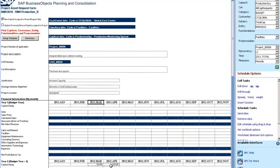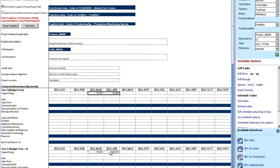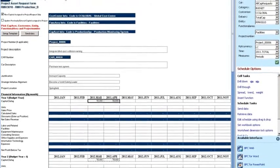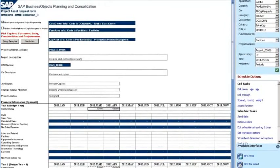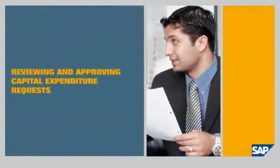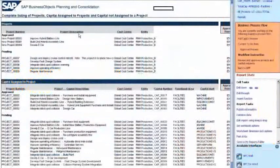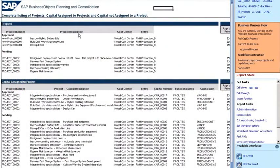In this example I'm a senior project manager responsible for reviewing and approving capital requests. To begin the approval process for the asset requests described previously, I look at the approval input schedule. Using the Starter Kit for Capital Planning, we've already defined different approval flows for requests of different dollar amounts.